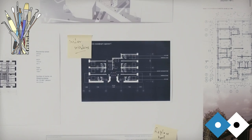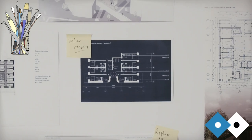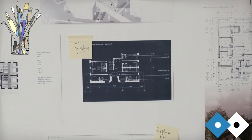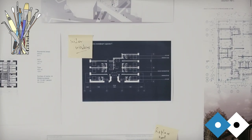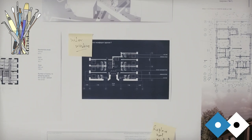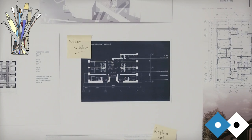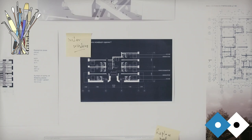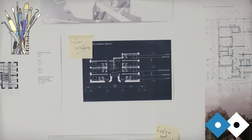The bid for 2021 would have gone in whenever it did, but the museum wasn't entirely concurrent with that bid. So the development stages would have happened after that. Even after we were successful in getting our funding, we were still having design conversations, even up until recently. We're still having some elements that can be changed, like writing parts of the text. There are now things that are set in place, like the building work's underway, but things can still be implemented further down the line in the project. So if attitudes change, it doesn't need to be like, in 2015 we designed how to make this set of text really accessible, and then 7 years later we've realized that's not the case but it's actually just printed now, so tough.